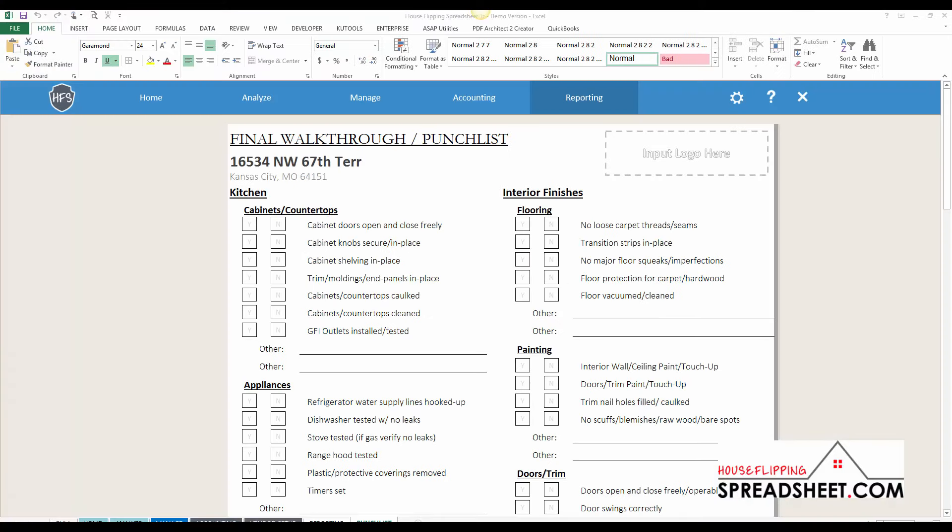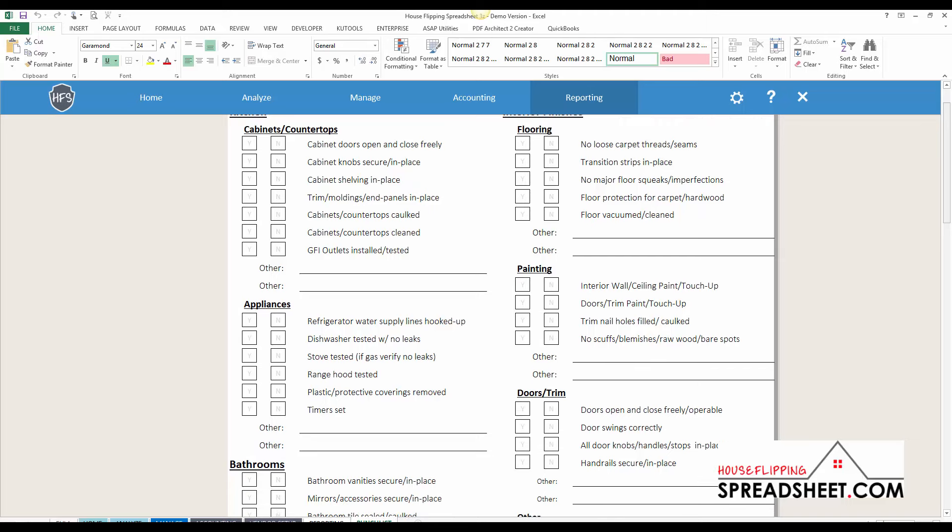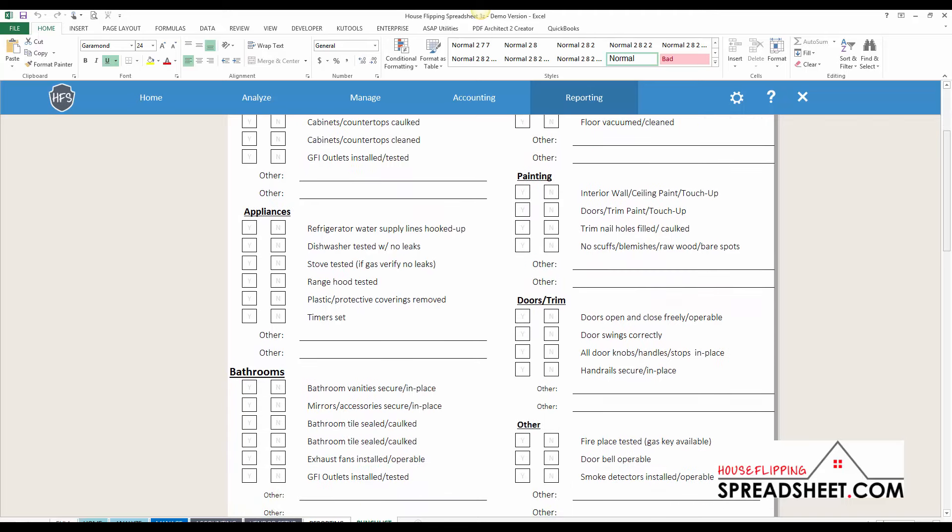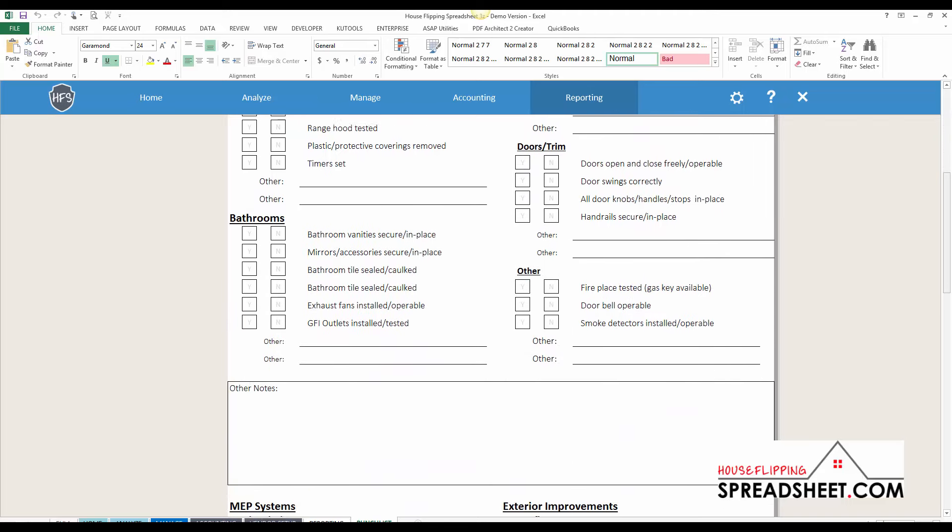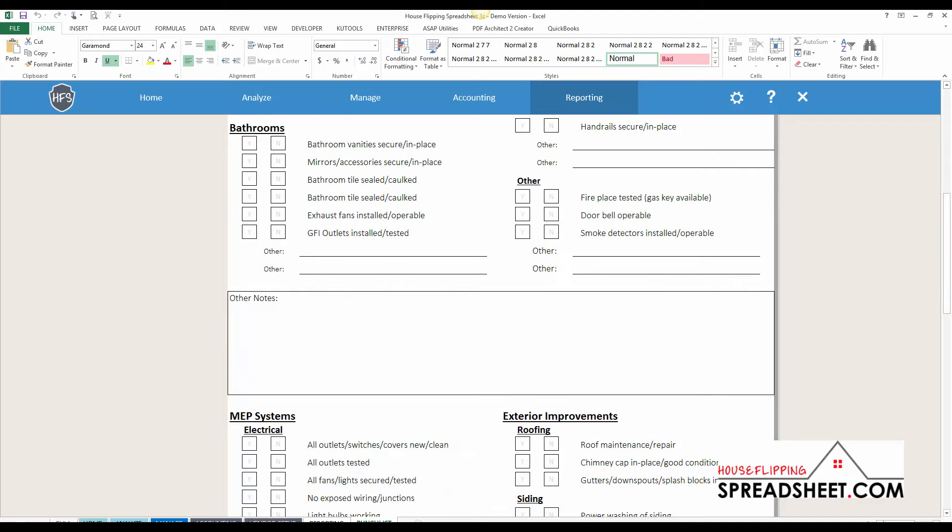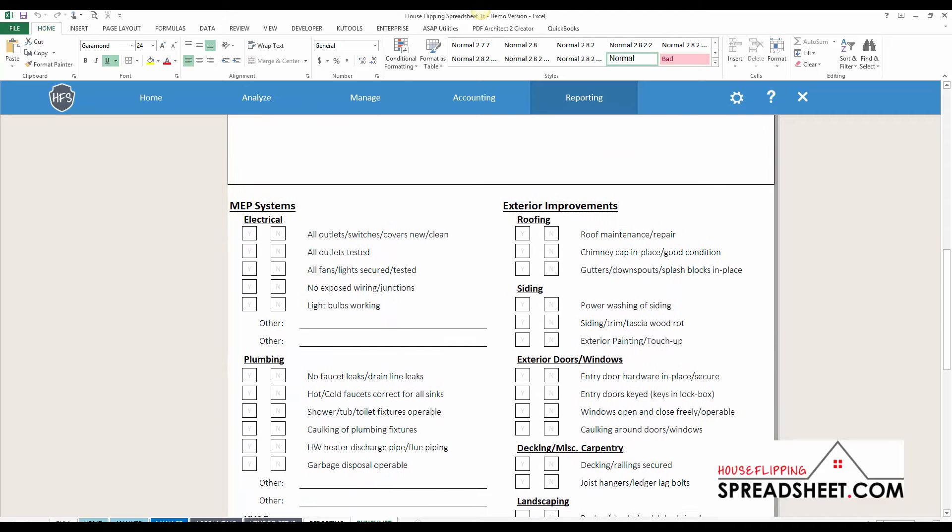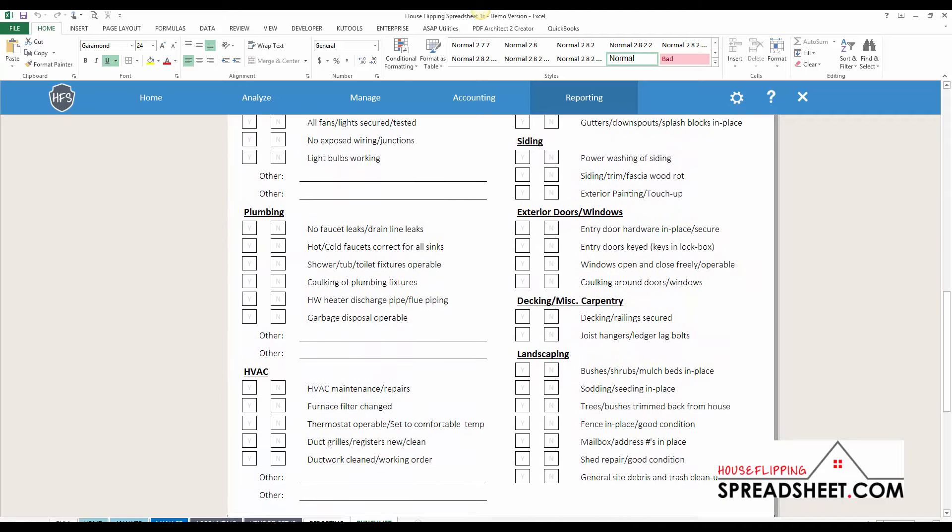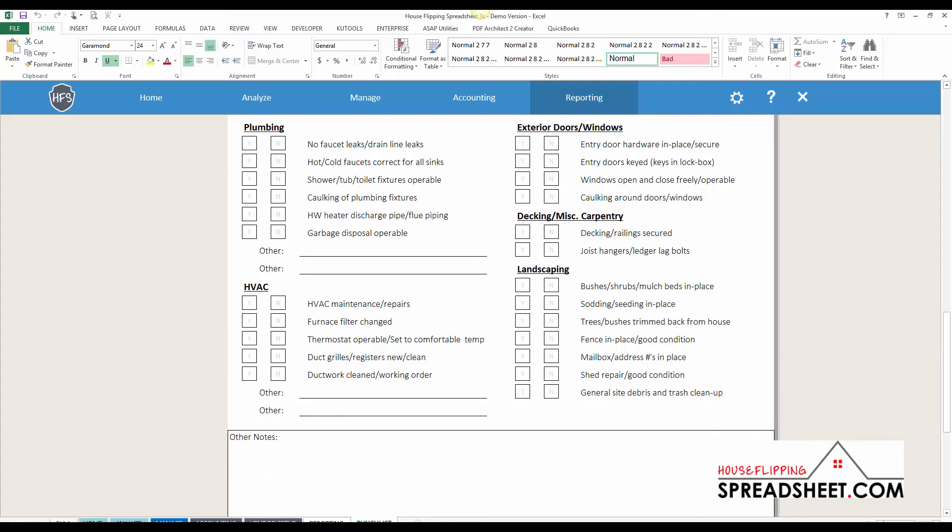The punch list report is a pre-built printer-friendly checklist that helps you close out your project and make sure that the home is ready to be listed on the market. The punch list report provides a detailed checklist that can be used to inspect the property and make sure that all of the finished details and preparations are taken care of before you put the property on the market.